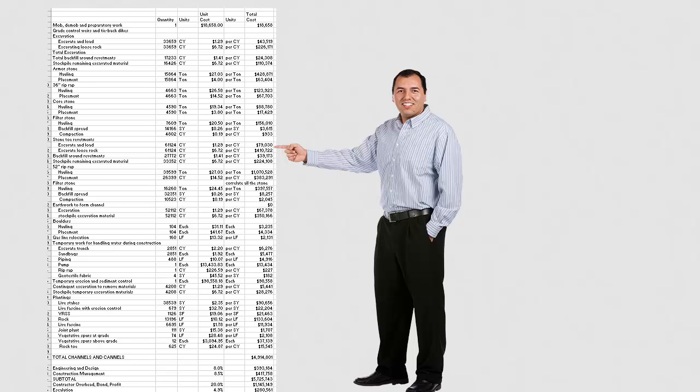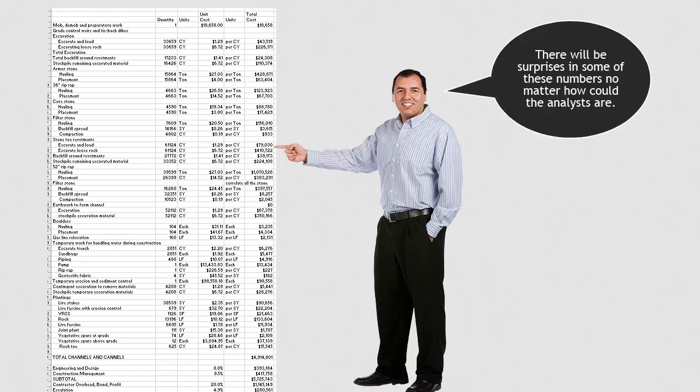A product or project may have hundreds of individual parts, and the engineers and analysts working on those parts may be excellent at their jobs. Given the uncertainty in the world, an engineer or analyst who could achieve 95% certainty is doing a heck of a job, but it only takes a few sub-spec elements to make the entire product or project sub-spec. We may be justified in having a high degree of confidence in our cost estimate, for example, and we may believe that any individual quantity or unit price will turn out as expected. But when we take the hundreds of components together, the probability of the cost equaling the sum of these most likely values can be vanishingly small.